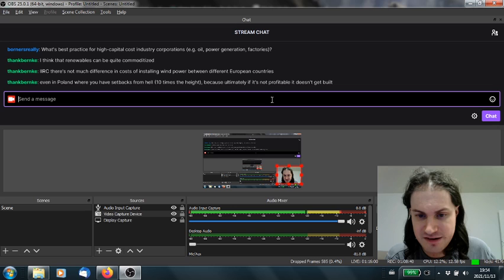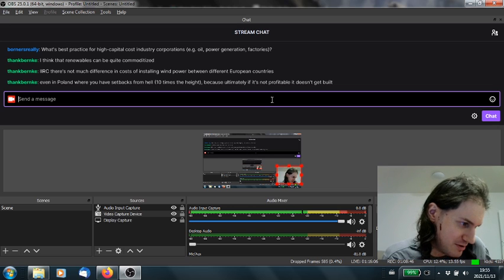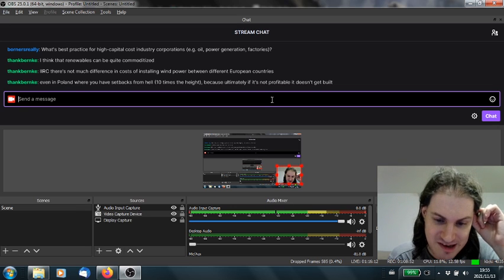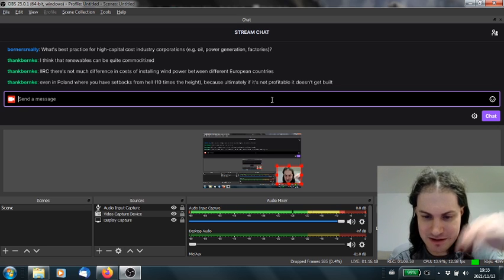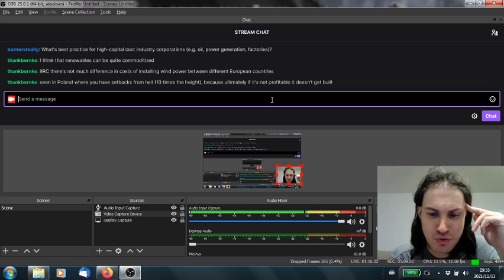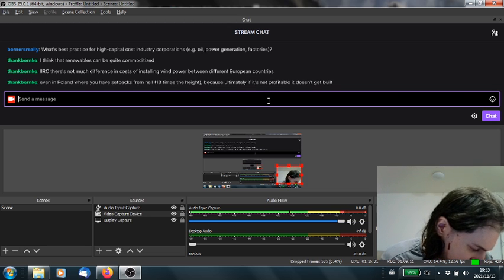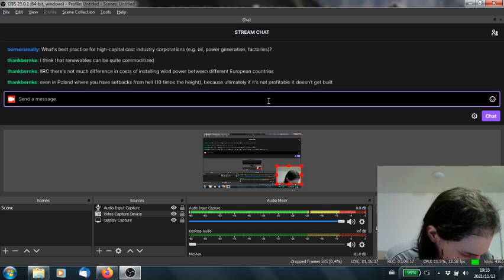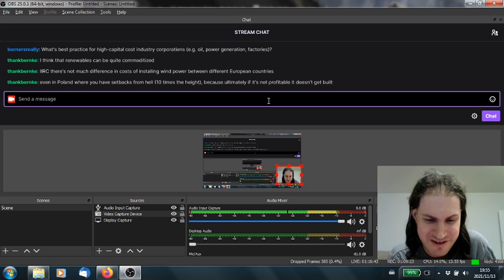Because the 60% design, I mean, the sort of stuff that is visible to the naked eye is pretty much all up to the 60%. I mean, maybe things that don't matter, like, is the bench in the middle of the platform for people to sit on going to be made of wood or metal? That might be a high, like, final design, but that's the most who cares thing ever, to the point that you want to delay that decision for as long as possible just because the commodity prices might change and you want to be able to take advantage of having a good price on one specific thing. So all of the big things like tunnel diameter, things like that, that's not just 60%. That might well be in the 5% design.